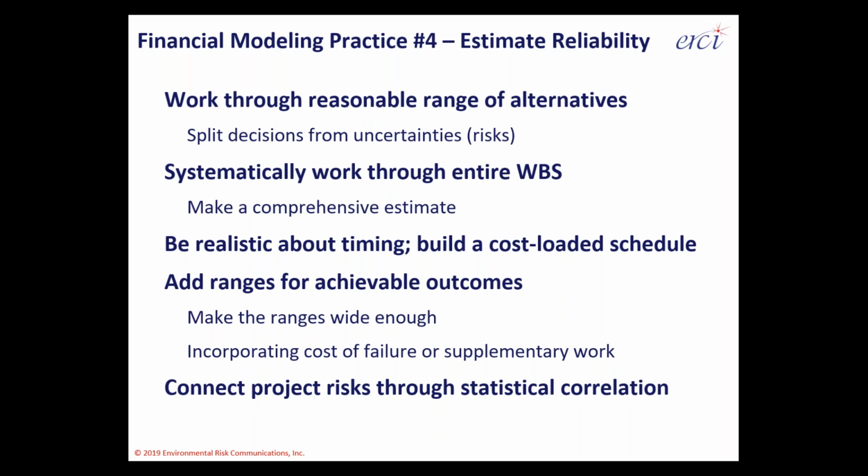So statistical correlation means you're connecting the probability that A and B and C will move up and down together, or A and B and C will cancel each other out or behave randomly. The default is that they'll behave randomly, like three different stocks in three different stock markets around the world. But the reality is, for environmental liabilities, if you're spending more in one area, you're probably spending more in another area as well. And there's an invisible hand that's moving the liabilities up or down within a range in concert. Again, that's a positive statistical correlation that you can expect.